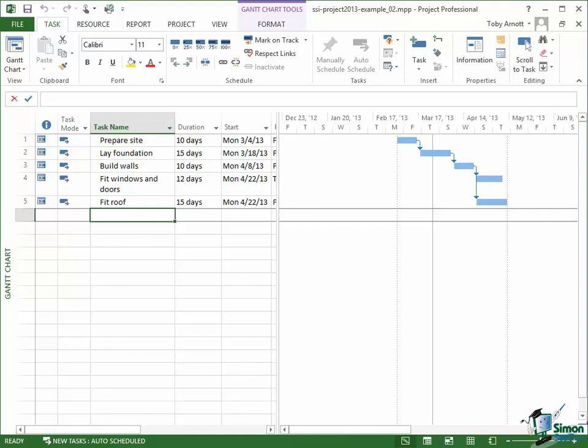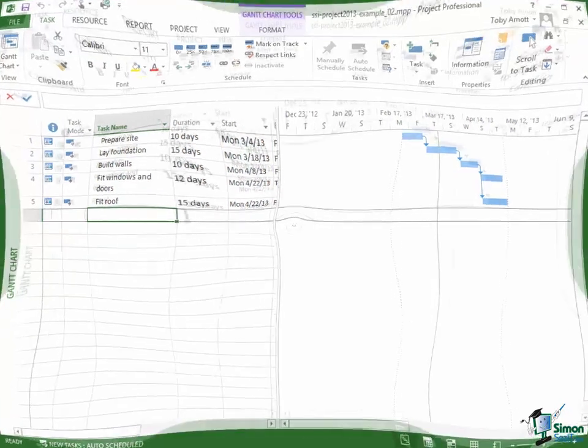By resources, I mean things like the people that are going to work on our projects, the materials that we're going to use, and the equipment that's involved in building this house. There are some other types of resource that we'll look at a little bit later on in the course. But for the moment, for our house build project, we're going to concentrate on the people and the materials and the equipment.